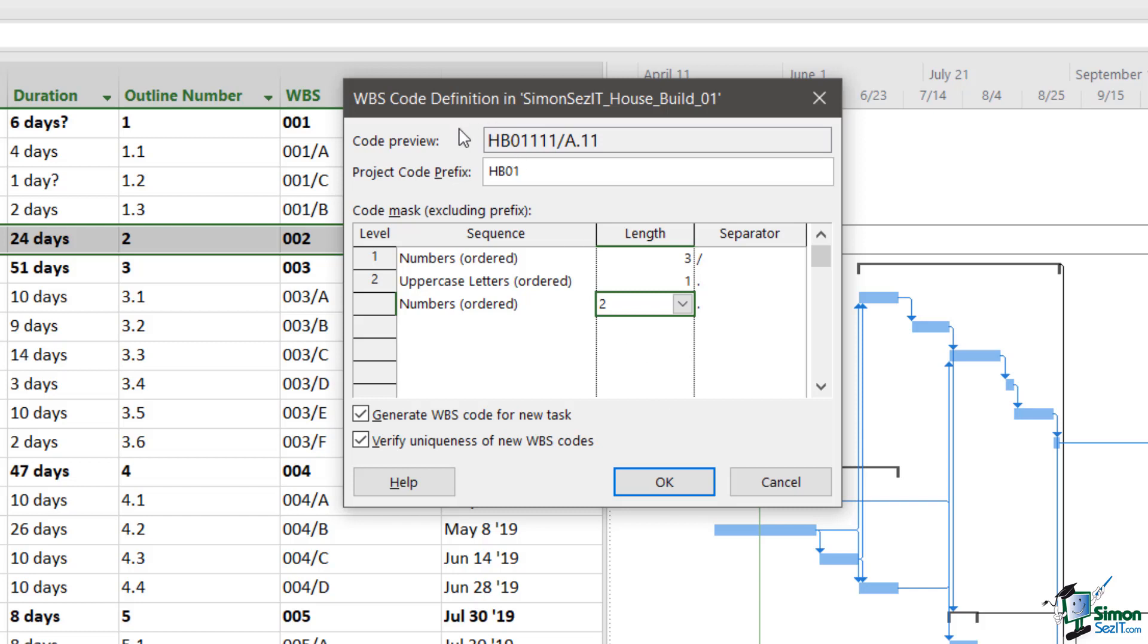And you can see at the top as I've done that, we now have a code preview and all of these are now in action in that code preview. What I also have are two check boxes towards the bottom of the dialog which says generate WBS codes for new tasks. So that means that when I insert a new task into my schedule, does Project 2019 generate this code for me? So I'm going to say yes, which is why I'm going to keep that ticked. If I uncheck that box, I would have to put in my own codes in there.